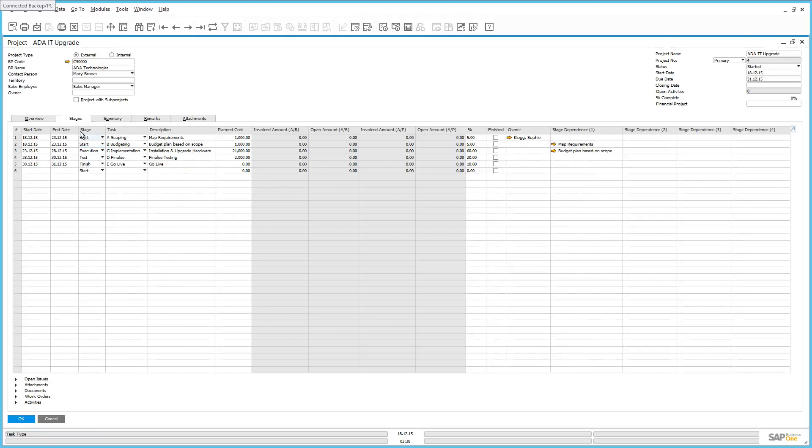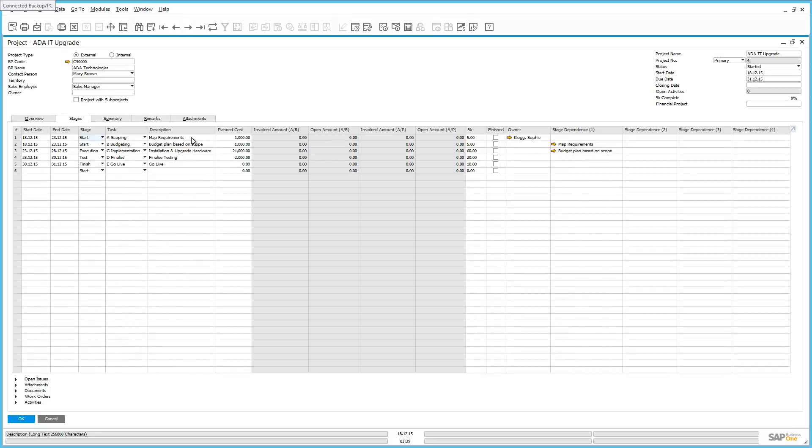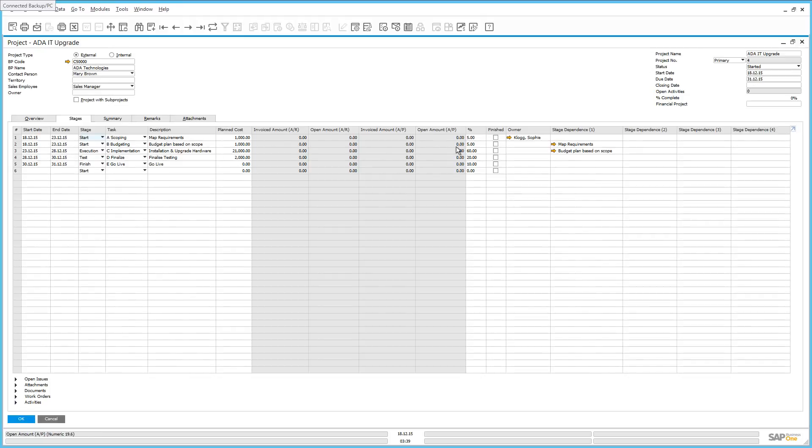For this project, we kick off the project with the start stage. And the task associated with this stage is the scoping task. And this is where we are actually going to map the customer requirements. Tasks, of course, can also be defined based on your project requirements. We then estimate a planned cost associated with this stage. And likewise, you can see any invoiced or open amounts relating to this particular stage of your project as well. We have also defined the percentage in which this particular stage will take across the entire project. For example, this stage is only about 5% of the entire project.